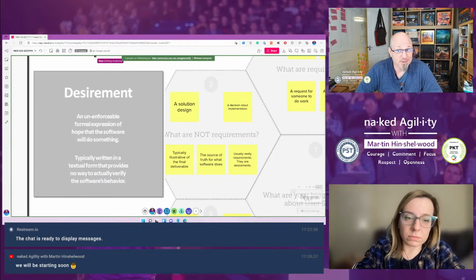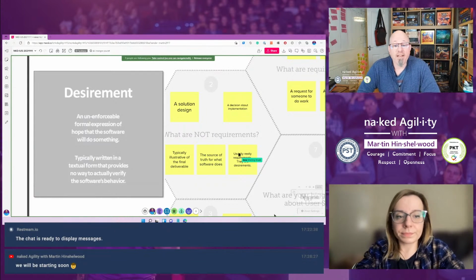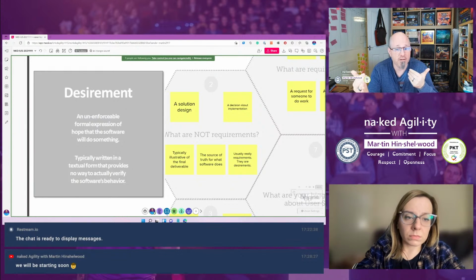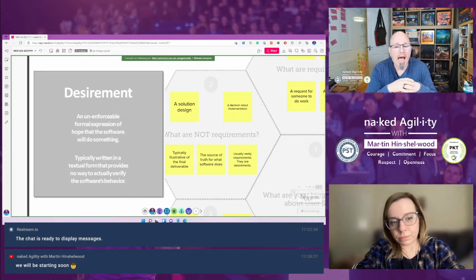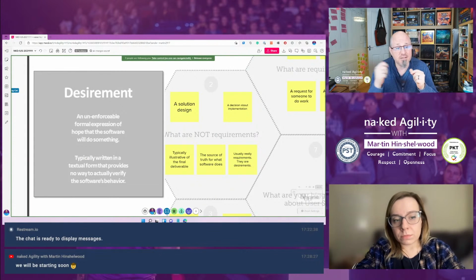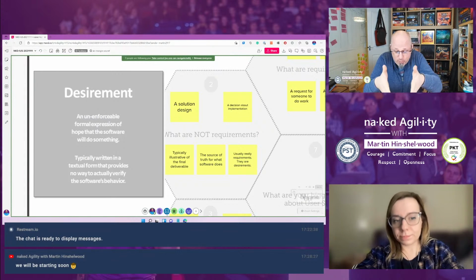So we want to leave this. One of the purposes of user stories, right, that was one of the other questions: why do we want to use user stories? It's because we want to leave the implementation till as late as possible, so that we reserve the right to change our mind. If we have the implementation defined in the requirement, that almost always locks us into one solution that might not be the right solution. When we get into actually doing it, maybe it's the wrong solution.